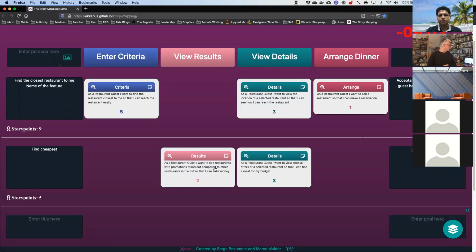Developing an app would involve UI, UX, database development, integration. How can you plan a story map, with stories reused or written for each of them? Well, this is the general case, just like with any other good user story. You don't want to create stories for your technical layers. You want to create stories around your functionality. And if you have a bit of functionality to be done, that should include the UI, UX, the integration, and all the database work that goes into fully implementing that functionality. So don't split it up into technical layers, because that's irrespective of the story mapping technique. That's just good product backlog item practice.